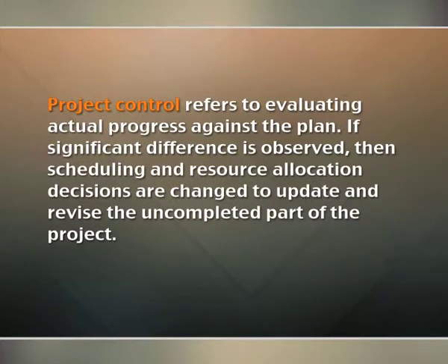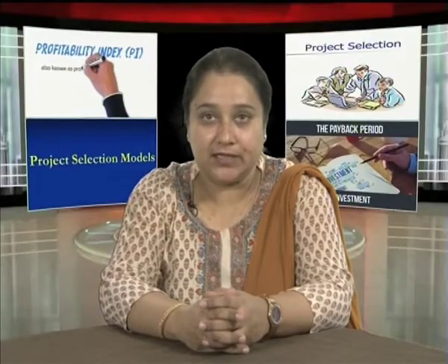Project control refers to evaluating actual progress against the plan. If a significant difference is observed, then scheduling and resource allocation decisions are changed to update and revise the uncompleted part of the project. In other words, remedial or modifying planning, reallocation of resources or cost minimization measures are adopted in such cases.